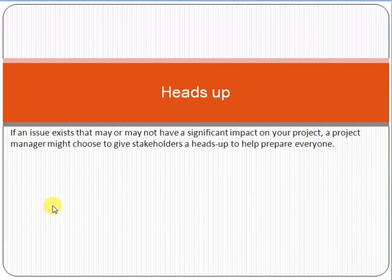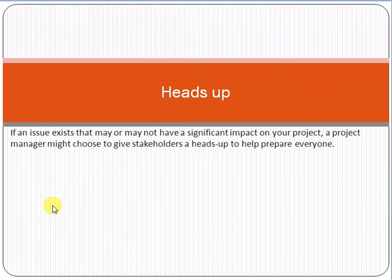Heads up means that if you know a bad thing is going to happen in the future — for example, you know this project is going to fail — it is better to tell about this as early as possible, like one or two months before. This way, the stakeholders get a heads up and become ready for it, so they can take whatever decision they want accordingly.